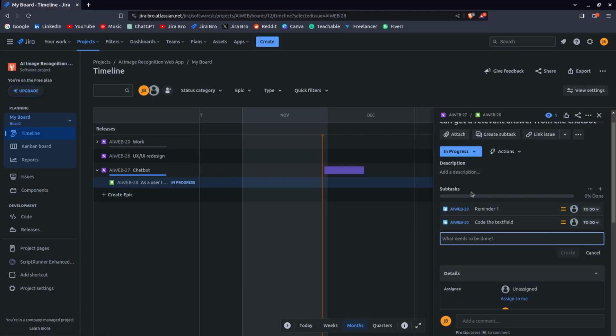And as you can see, when all of the subtasks are completed, the story is completed. Depending on how many stories are within a single epic, and when the tasks within the stories are completed, it will determine what kind of actual progress is being made.